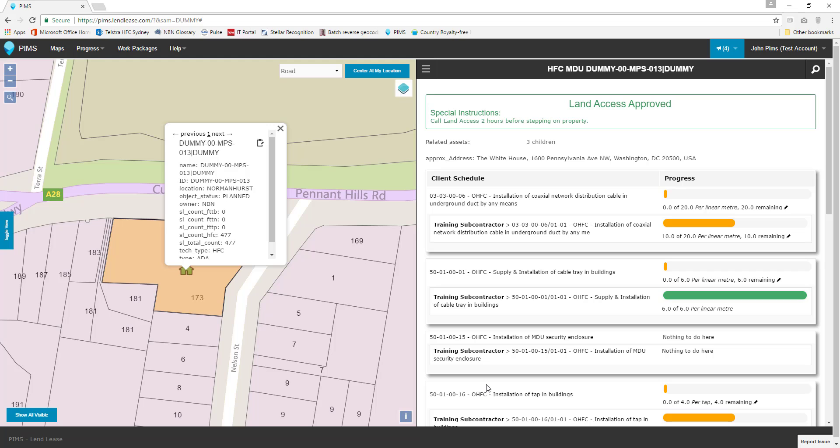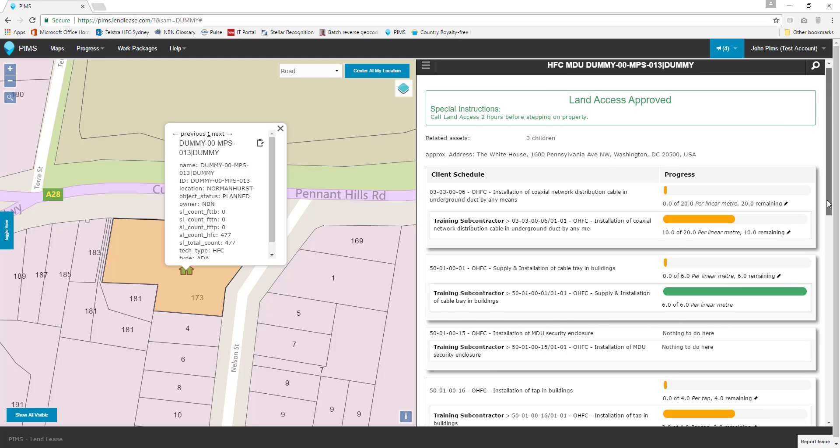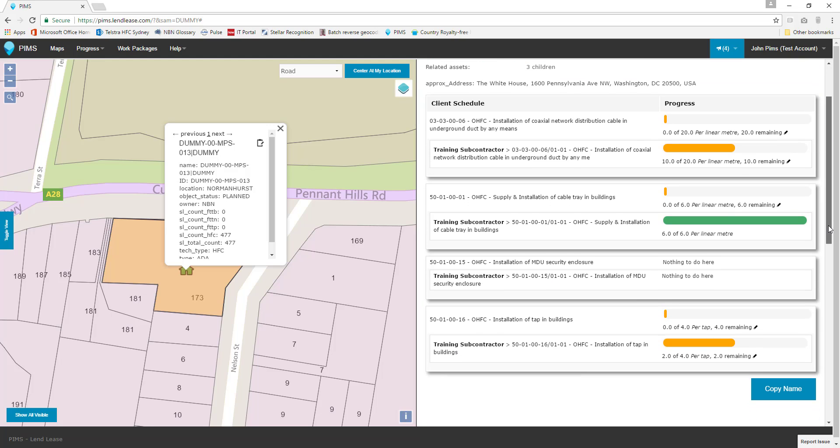Let's take a look at how our work listing has changed. We can see that our installation of hardline schedule now has a half completed progress bar and the progress text tells us that 10 meters have been completed and 10 remain. Our cable tray shows complete with a green bar and no remaining quantity text, and our Taps schedule has been updated to reflect that two tap installations have been completed.